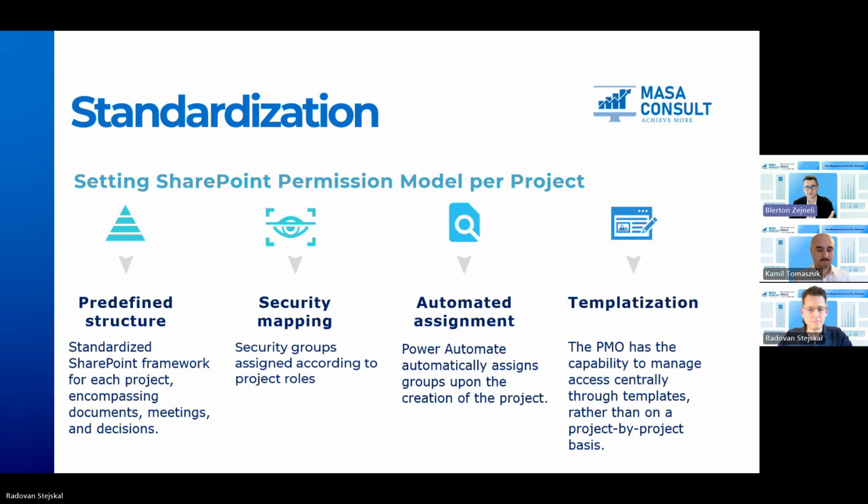So in addition to governance, the other aspect, which is really crucial and we pay very close attention to, is standardization itself. If we look at SharePoint and also Smartsheet Control Center, there are a lot of governance issues that are approached here. In our approach, each project gets a standardized SharePoint structure, and it also gets a dedicated Smartsheet workspace or Smartsheet project folder. And each folder contains the documentation, the steering committee materials, decisions, and so on.